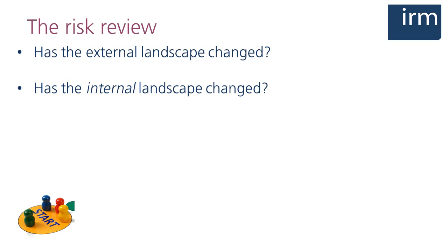And as we've said, over time new risks may emerge. Don't just assume that the risks you thought of when you started your new strategy or project last year will be the only ones you face during its lifetime. Now, if you're in a meeting to discuss the progress of a piece of work, it's a good idea to wrap up that meeting by thinking about whether discussions have highlighted any new risks that should be added to your risk register. And look at the action that's been taken to treat risks.